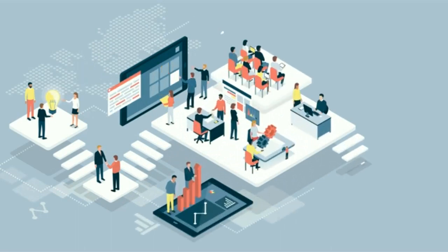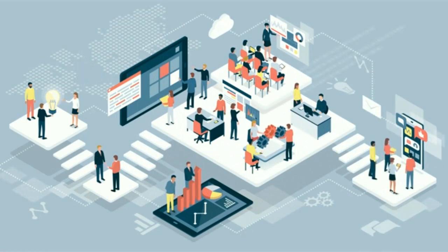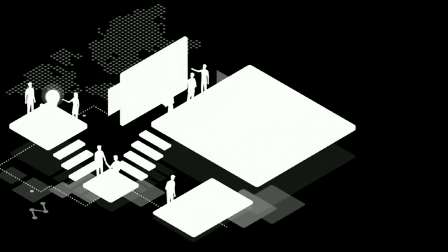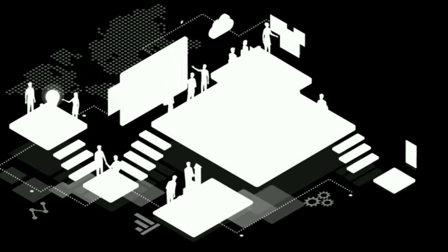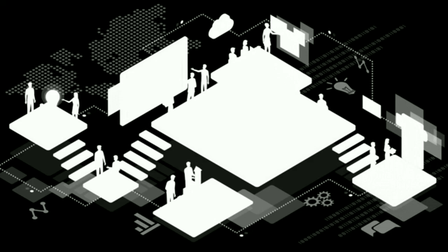Mini waterfalls occur when the team addresses all of the requirements in a given period, then attempts to do all of the design, then moves on to do all of the building. When team members collaborate to produce a small number of features across the board, they learn as they proceed and deliver smaller finished features. Agile projects benefit from project team structures that improve collaboration within and among the teams.